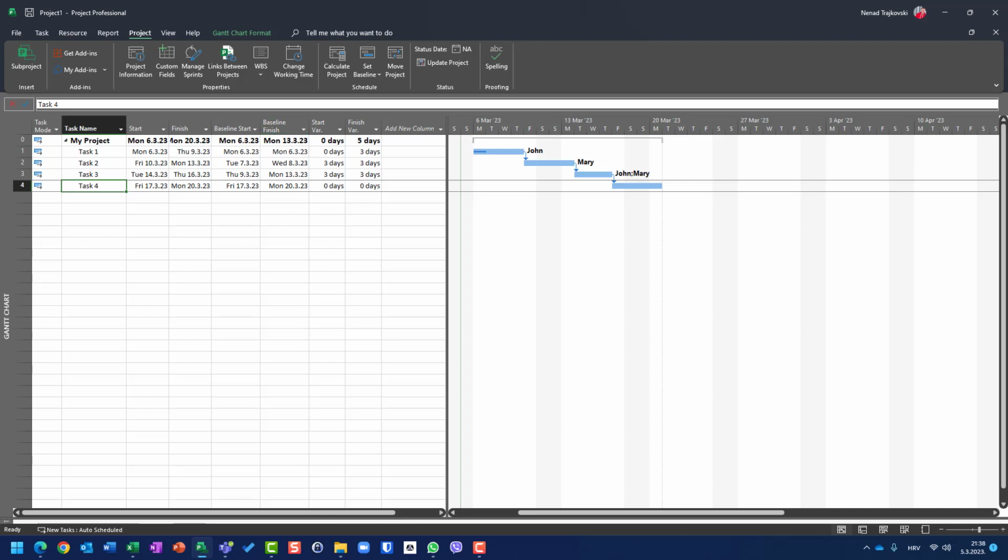It is a little bit complicated, but I hope that you understand my point, and that is, after you create a baseline and you create additional tasks, these additional tasks should be included as is in your existing baseline. No matter if it's supposed to start earlier, but you forgot to include it in your schedule when you created the baseline. Thank you very much. Have a nice day.